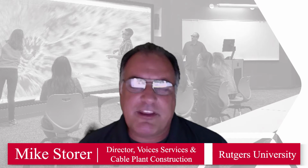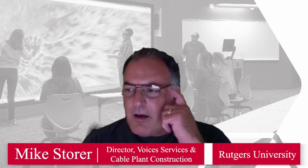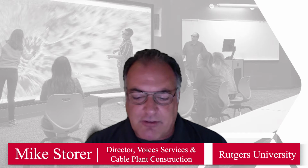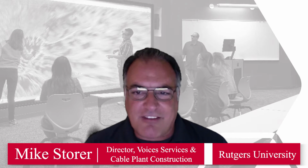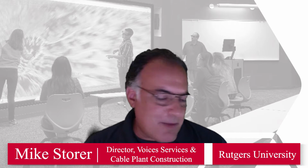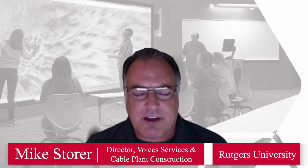And Mike, I know at Rutgers you have some significant effort that's gone into strong design standards to hand off to the architectural team. Is there anything you want to add to how that process has helped and what you've done to create those standards? Yes, at Rutgers we've developed a very strong Division 27 telecommunications specification that we share with facilities and any of their partners, whether it be an architect or a developer. It allows them to see what our expected design is. It also acts as a playbook for the specification of equipment and materials that are going in on the project. It allows them to understand what they're actually bidding on, because a lot of times if you don't really explain the level of detail that we expect, the type of fire stopping, type of cable, type of connectors, we want to make sure we put that all out in front of them so we can discuss that at our project meetings as the project develops.